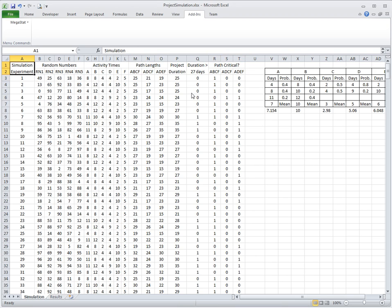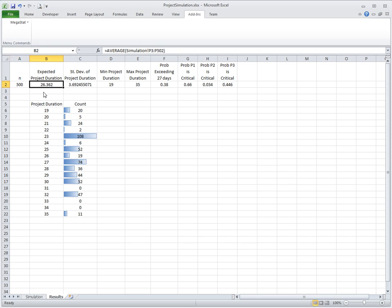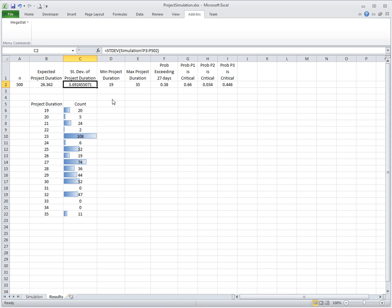This is just raw data from the 500 simulation experiments. What can we do with them to do statistical analysis? In the second spreadsheet we have some analysis. I computed here a number of experiments with a count function, which is 500. There is computation of the expected project duration and standard deviation of project duration.